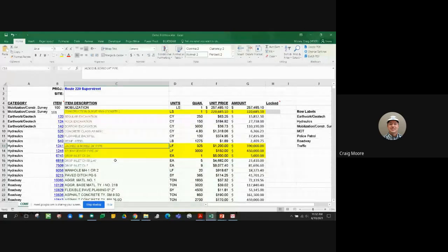our part, so that we don't end up at the end with a shortfall, either when it goes to advertisement and we get bids in, or end up with a change order or some differing condition clause and ultimately a work order. So trying to best account for those through our estimate up front when we're applying for this funding.